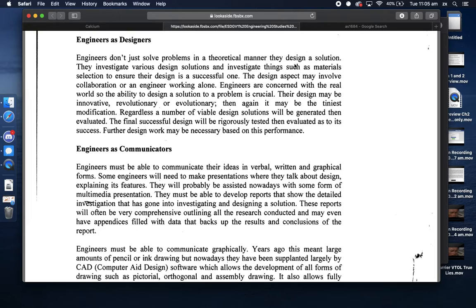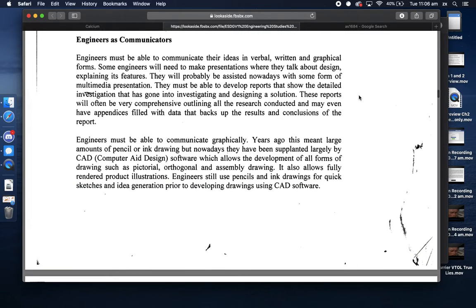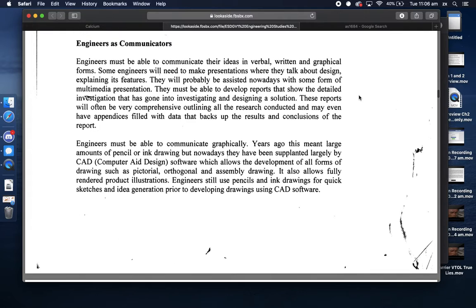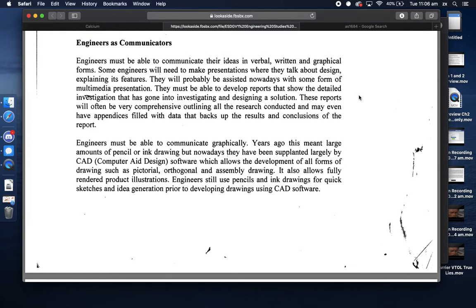A possession is typically 48 hours and is planned to the minute. You have to return the track to the rail authority - now called Sydney Trains - by around 5 a.m., and if you're one minute over that's a huge fine. A huge number of people come on site, a lot of work is done, and then we hand the track back. After every possession there's usually a lessons learned where people discuss what we could have done better and what the next possession team should be aware of.